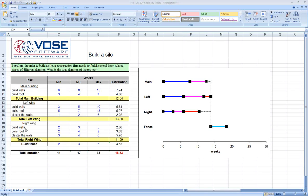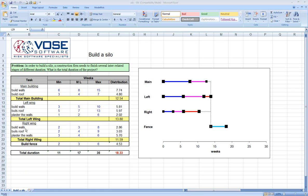In project risk analysis, both for schedule and cost, expert opinion plays a very important role. The reason is that in most cases when you're building a construction project or estimating costs or schedule, it's for a project that is unique. It's never been done before, so it's very hard to use lots of historical data.